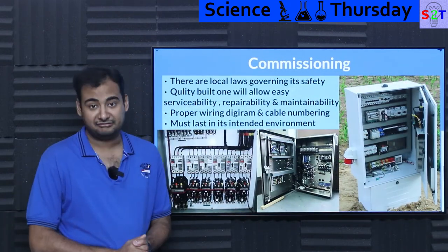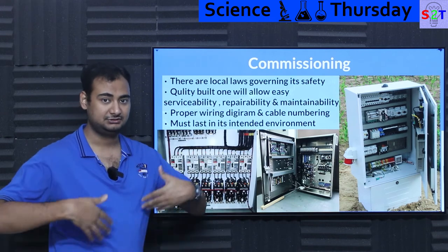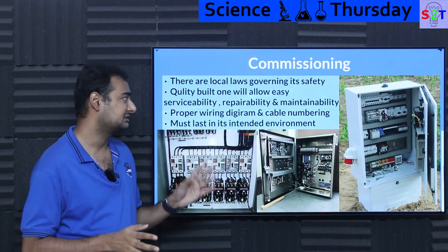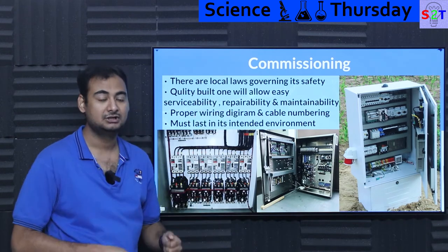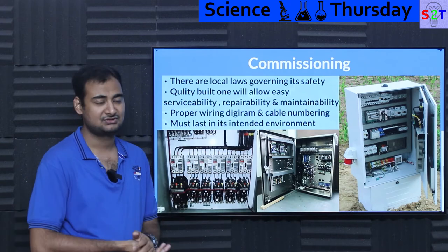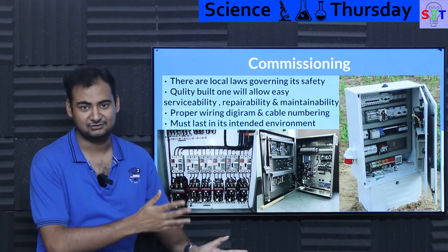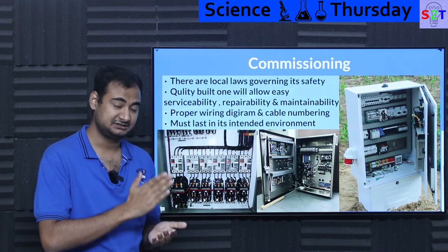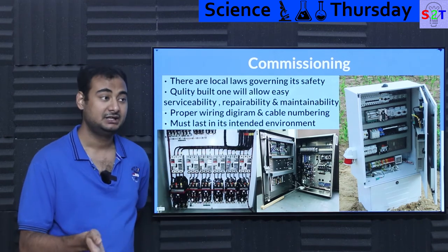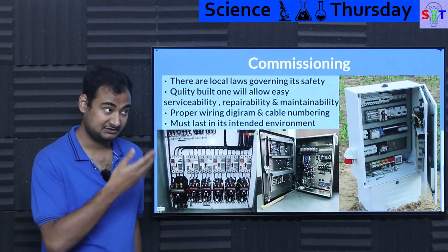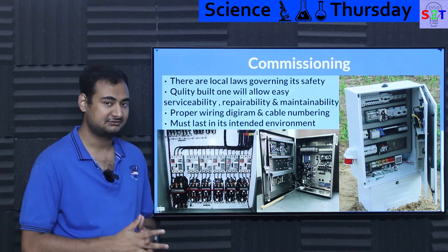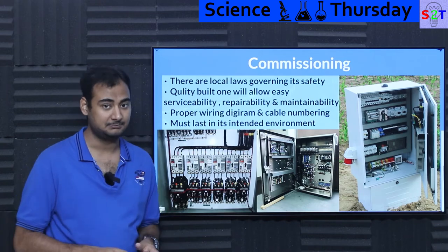Finally we come to commissioning — how do you deliver it to the customer. There are local laws, specifically when dealing with high voltage; it is not something you can just build and hand over. It has to go through commissioning. Depending on your local situation there will be codex requirements: Is there proper grounding? What is the ingress protection level? If you are in an environment with oil vapors, what is the arc probability? Local laws apply.